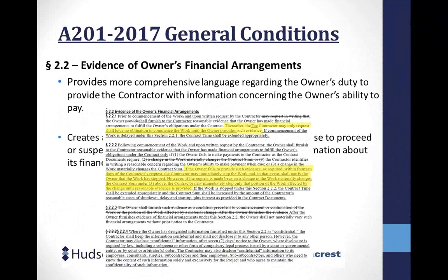So if you are going to negotiate it, you still want to push on them to say, fine, but non-payment doesn't tell us enough, because non-payment means we're already 30 days out. We've already got commitments to subs who aren't getting paid, and we don't know if you're actually going to fund. So those are things to consider as you negotiate.